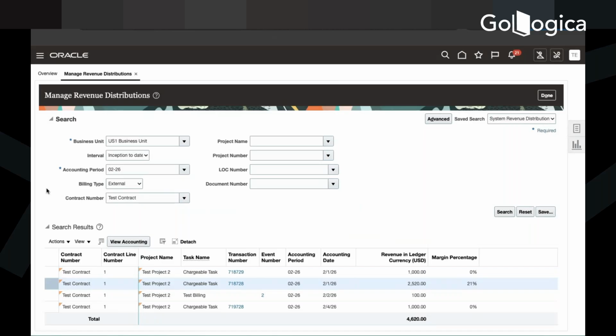So when we have a rate-based invoice method and the revenue method as billed, there is one condition: you will be able to recognize the revenue only when the invoicing is done and those invoices are imported to receivables. If the client has a hard stop, and says I want to generate the revenue only when the actual invoicing is done, they can select the revenue method as billed. So we have that flexibility over there.